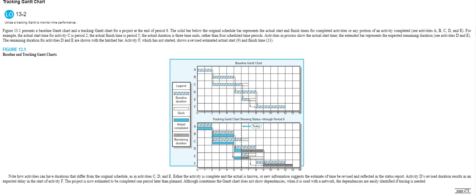It could be requested, it could be formally reviewed, it may be accepted or rejected. But for now, here is the baseline. And if major changes are approved, then a new baseline is in place. And this is used to support progress reporting throughout.